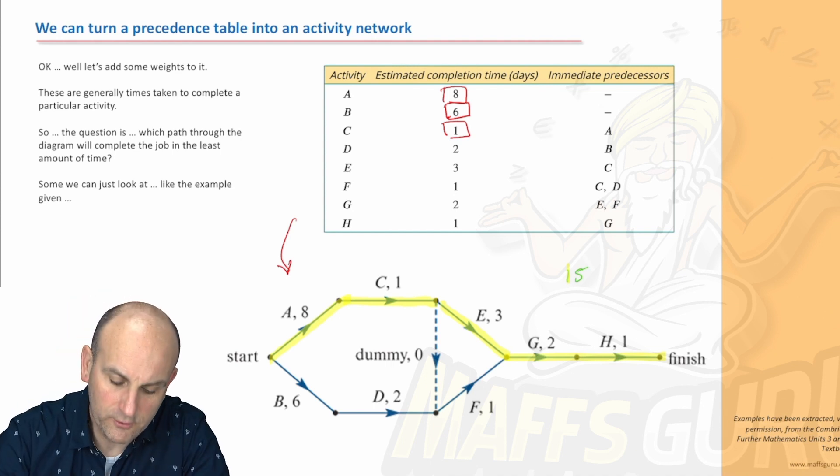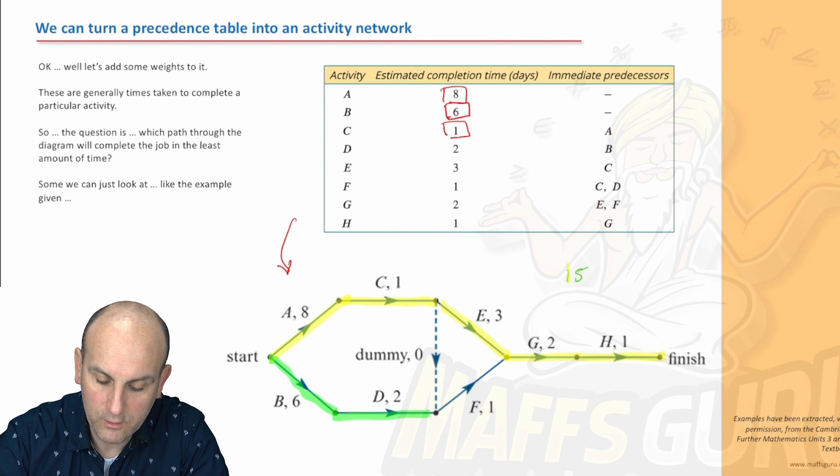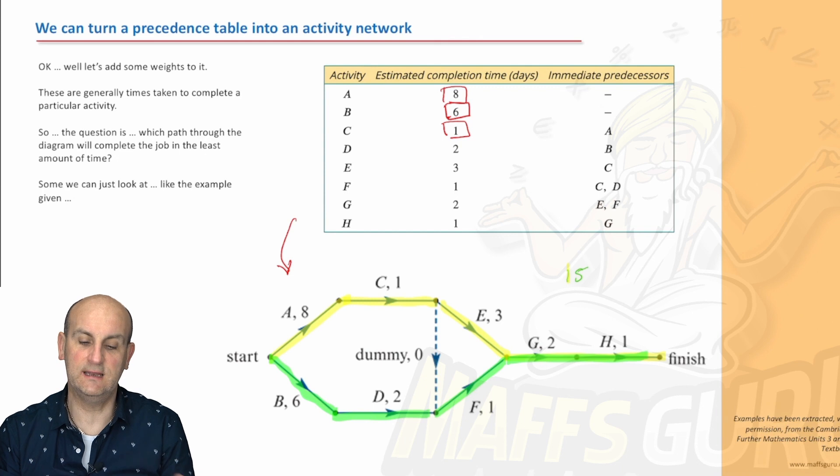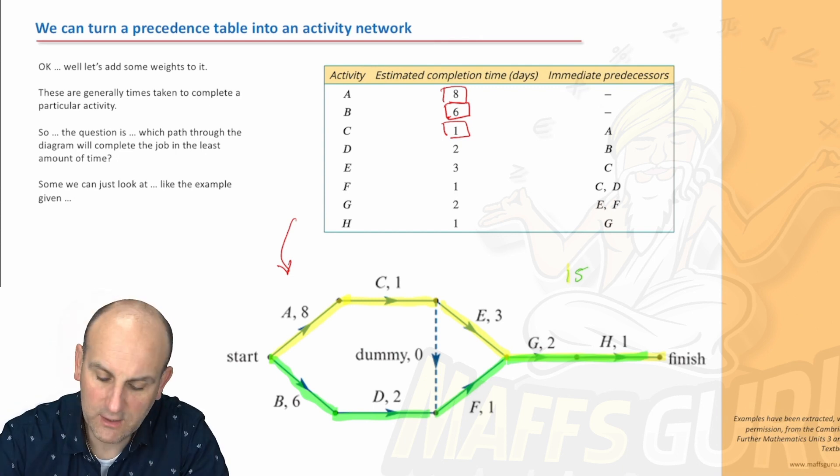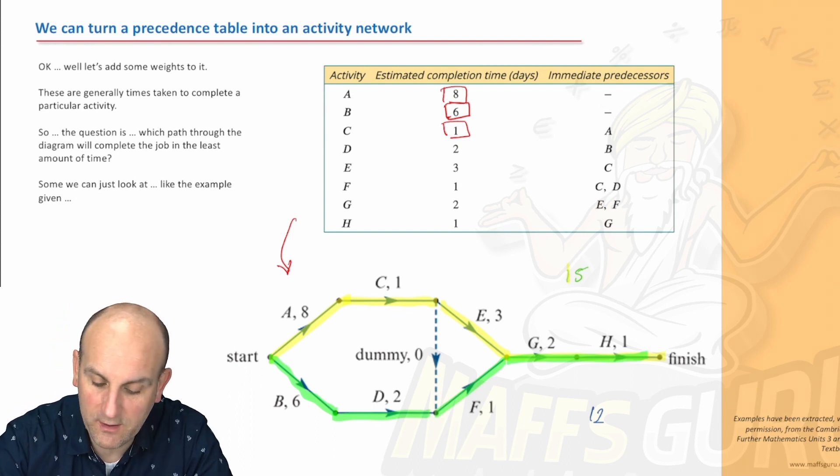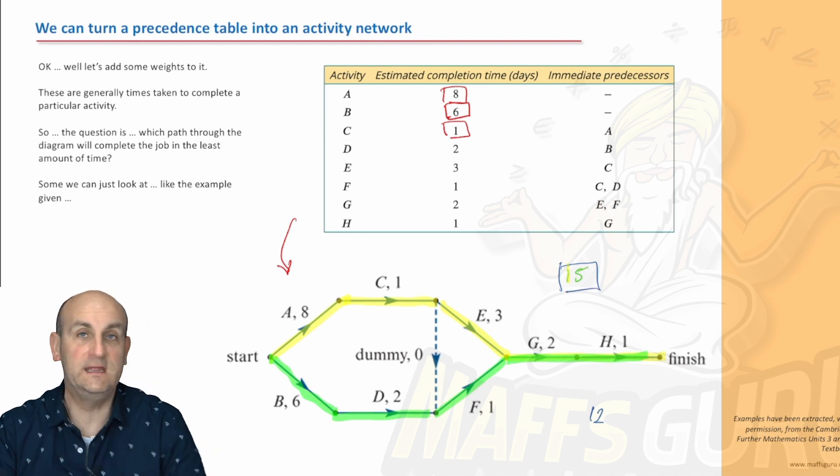Because we could equally go through here. And in that situation, we would have 6, 7, 8, 9, 10, 11, 12. So going that way would be 12 days. Oh, well, we'll do that then, yes? No. It just actually means that we could complete it in 12, but not. Because this yellow path is still going to take 15 days to do.